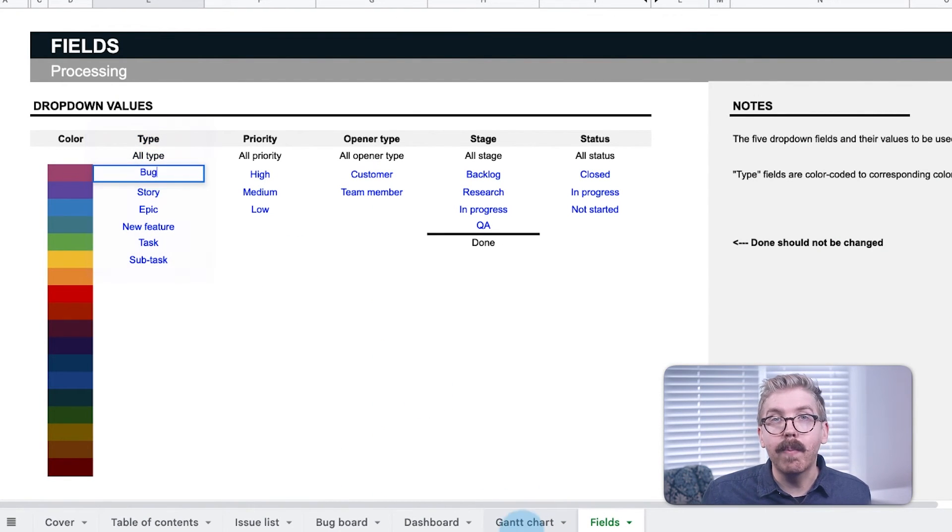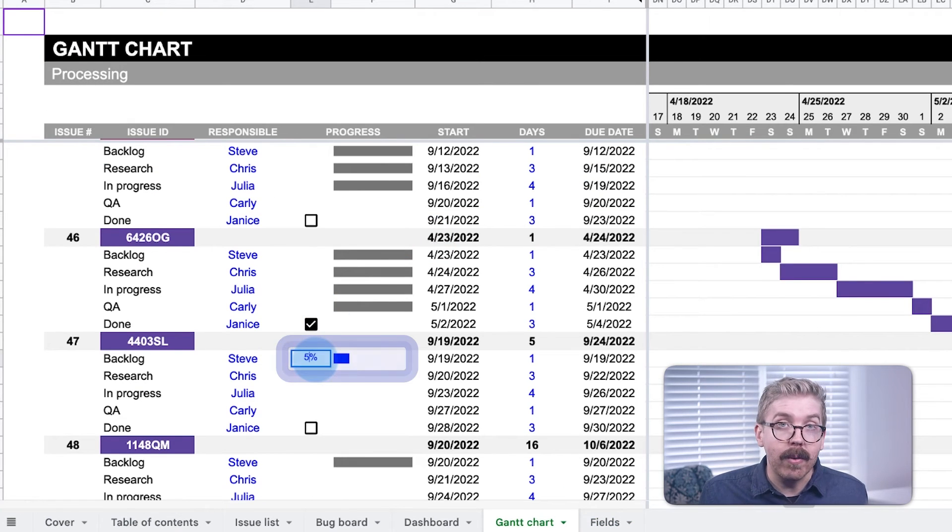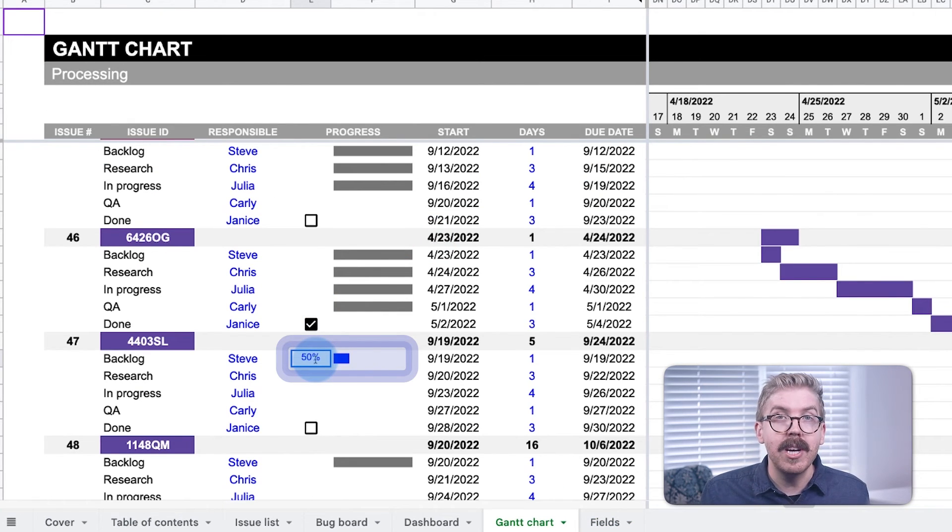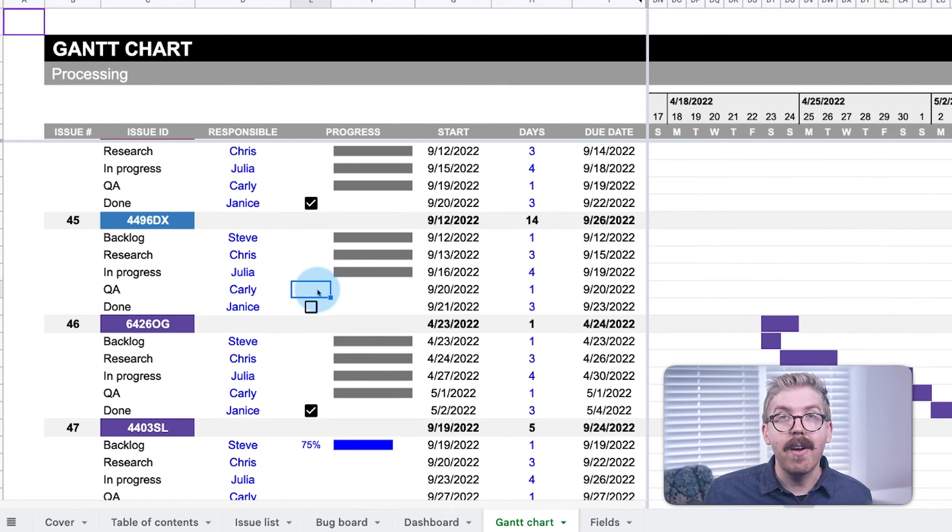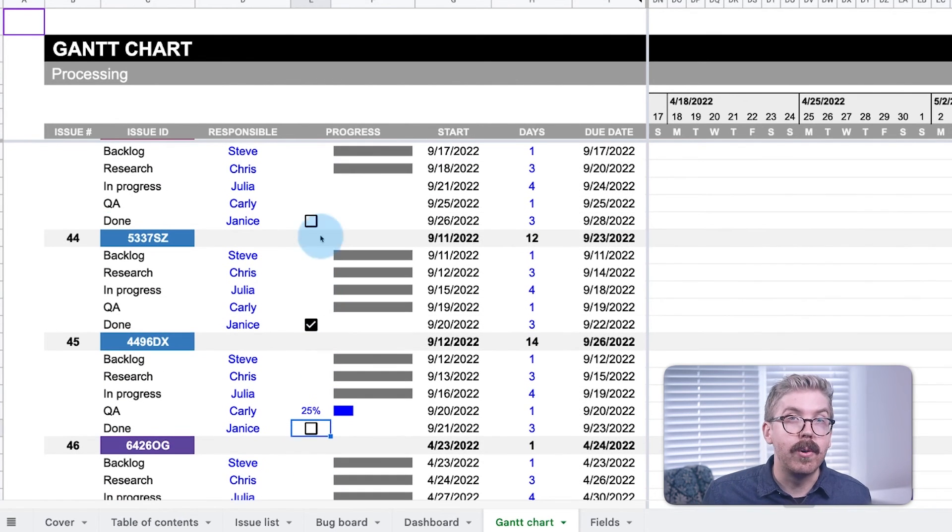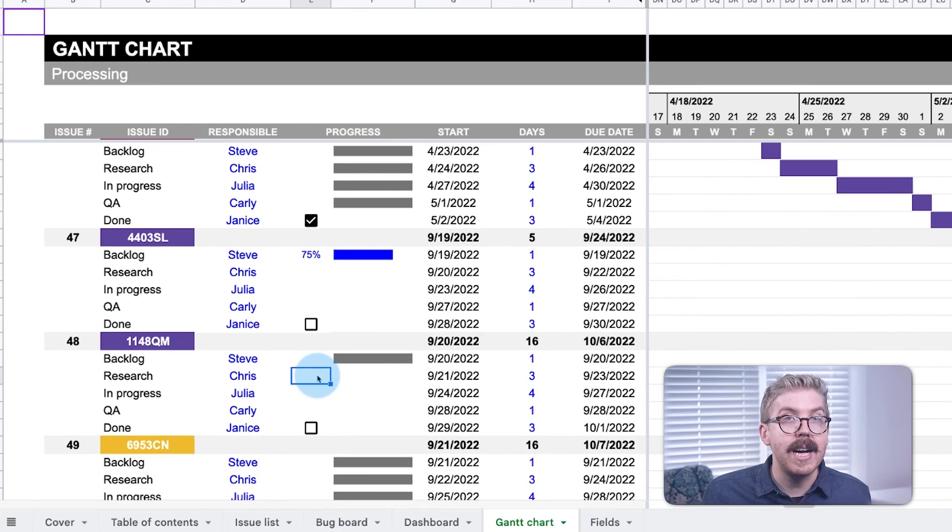As team members make progress on their individual issues, they can edit the progress bar of the active stage by changing the percent to completion next to the bar. This provides accountability for the whole team, so progress is made on active tickets.